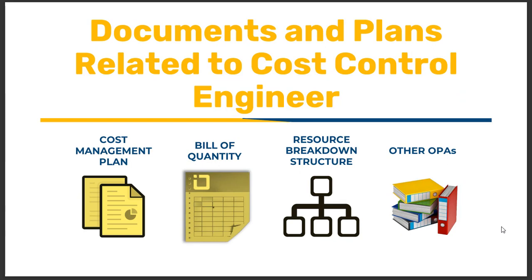The necessary documents that the cost-control engineer will need throughout the project include the cost management plan, which explains in detail how costs will be estimated, monitored, controlled, and reported to stakeholders. Next is the bill of quantity (BOQ), which in most cases is prepared by the cost-control engineer. This document lists the quantities and costs for each resource, and the total project cost is obtained using it.